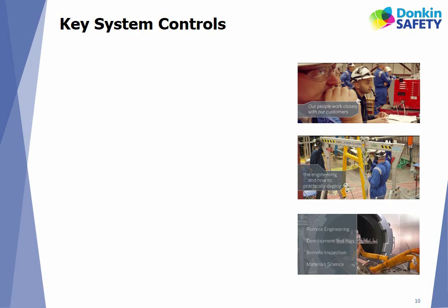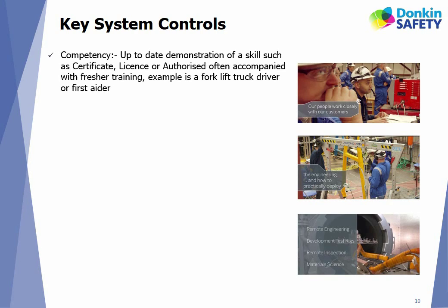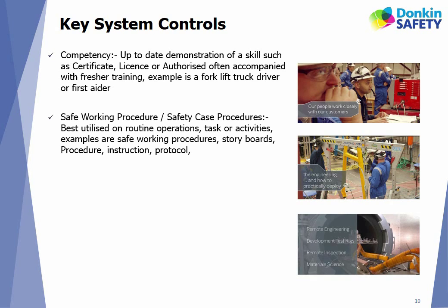Before you sign off on the risk assessment, consider 4 things. Competency. What is the makeup of the work team? What is the team's skill set and competency level? Safe working procedures. What procedures are there in place that you need to follow?